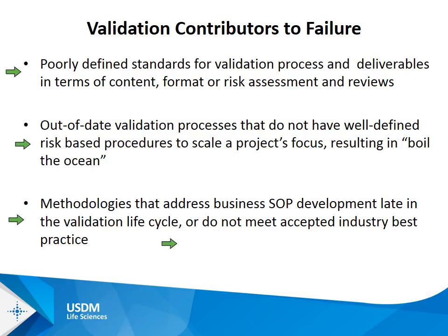And then often, I shouldn't really call it a methodology, that addresses business SOP development late. That's not a methodology, that's just an omission, where people have a lot of things in their head, but they just don't want to write it down, and by the time people start doing that, they have a lot of unexpected requirements pop up. So this, again, is a major pitfall in the validation process. Your validation partners should be making sure that SOP development is in parallel, if not with the IT project itself in terms of development, then with the validation process from the very beginning.